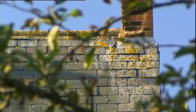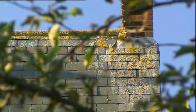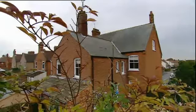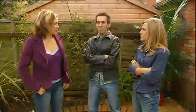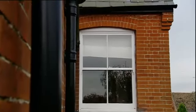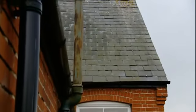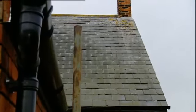But there's no escaping that the roof needs replacing. Just one area that maybe you cut a corner too far, and that's the roof. Bloody roof. I'm sick of hearing about that roof. And the point is it will come up on a survey, and therefore you will either have to do the roof or probably take money off your asking price. If I can't actually be bothered to go back to doing it, then I'll just take less for it. This is one of Mike's cutbacks which won't pay off, and it will affect his final asking price.